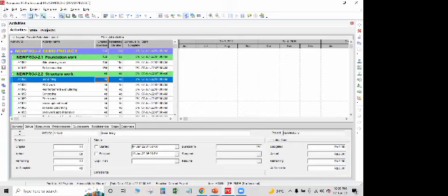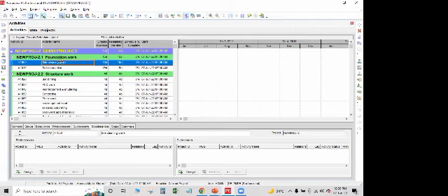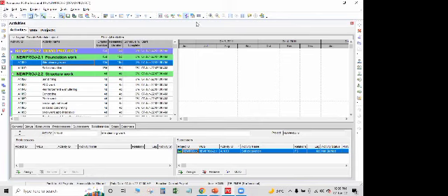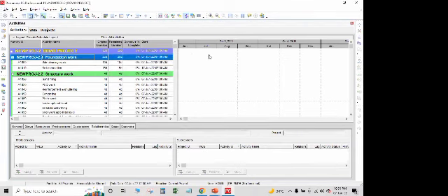तो इस तरीके से आप एक्टिविटीज दे सकते थे, यहाँ पर ड्यूरेशन दे सकते थे सबको। और फॉर गिविंग द रिलेशनशिप, what you can do is, if you go here in the down, this is the relationship tab. Let's suppose साइट क्लीनिंग वर्क के बाद सॉइल एक्सकवेशन आपका स्टार्ट होना है, so you can just select your successor, select this successor and that's done, right? And that's how you will add the relationship, if you'll schedule this project up, right?